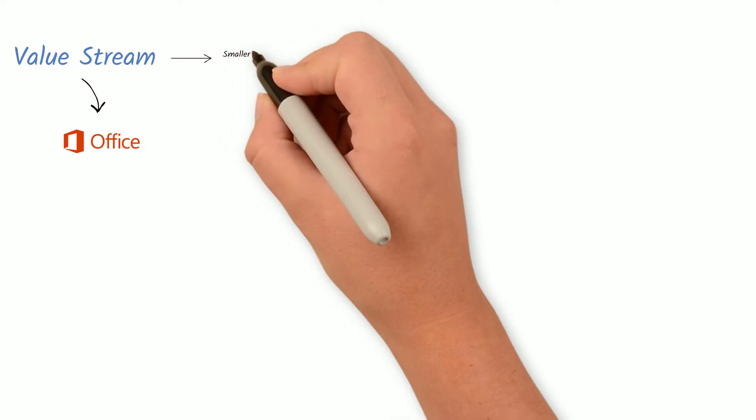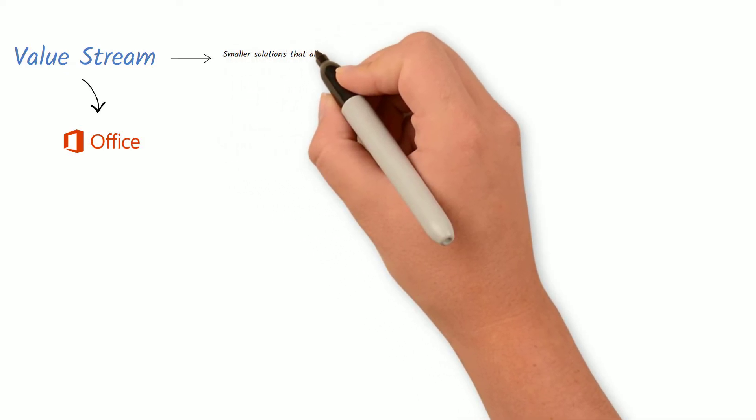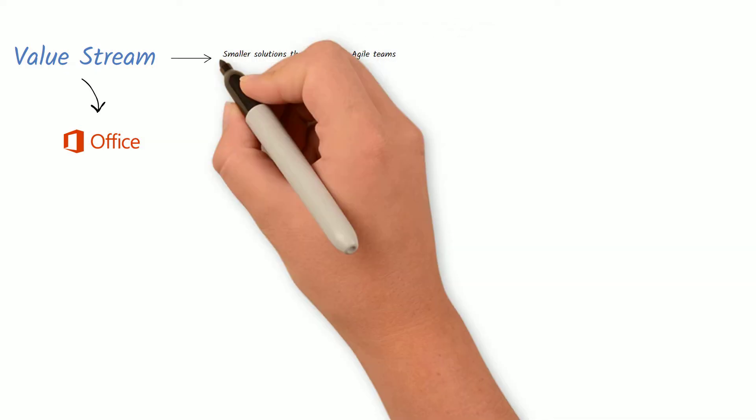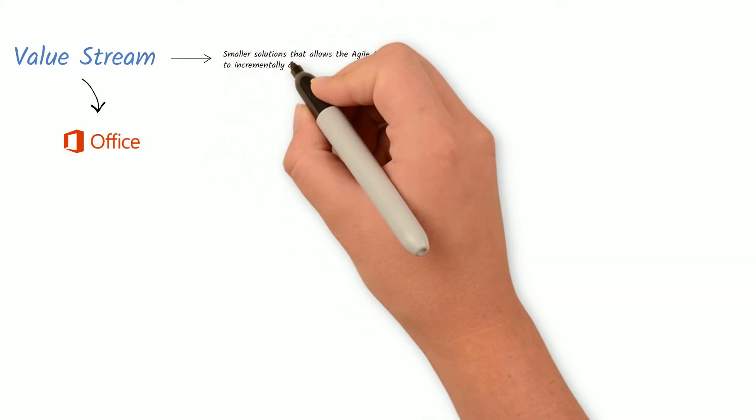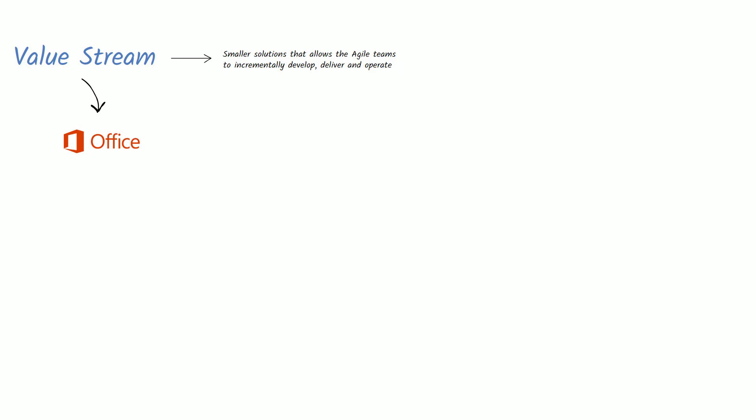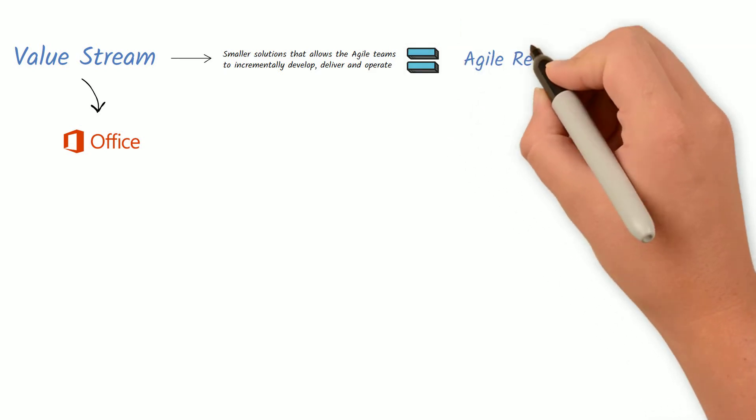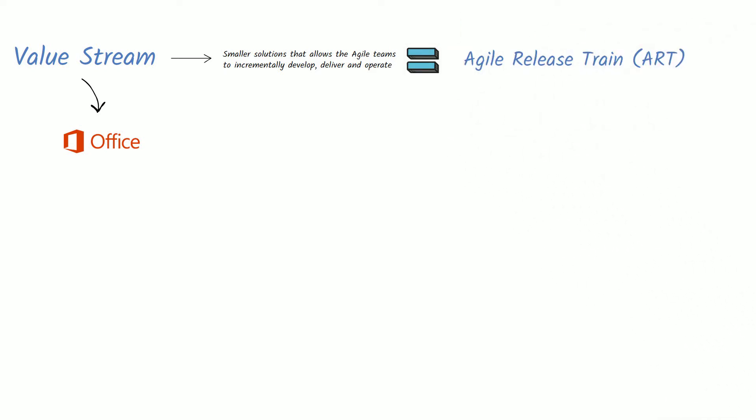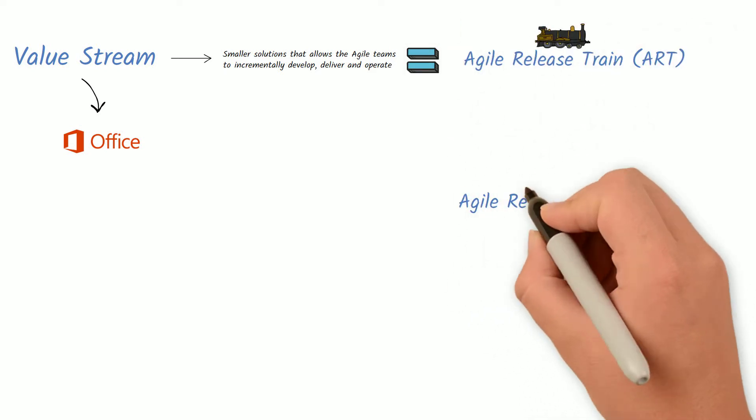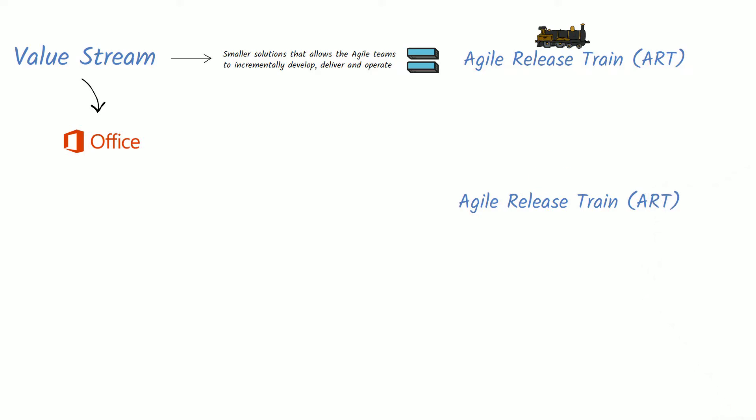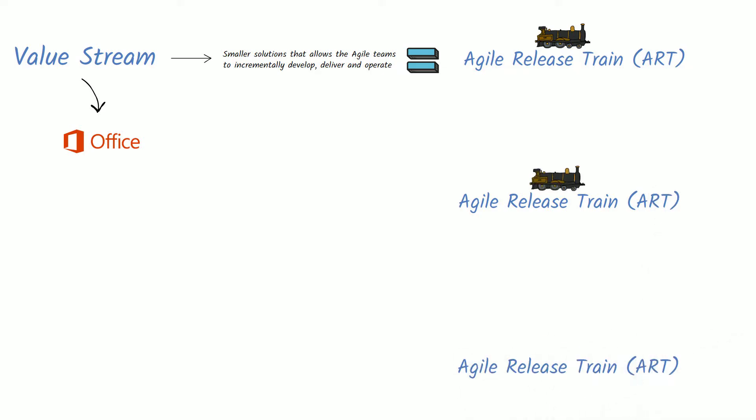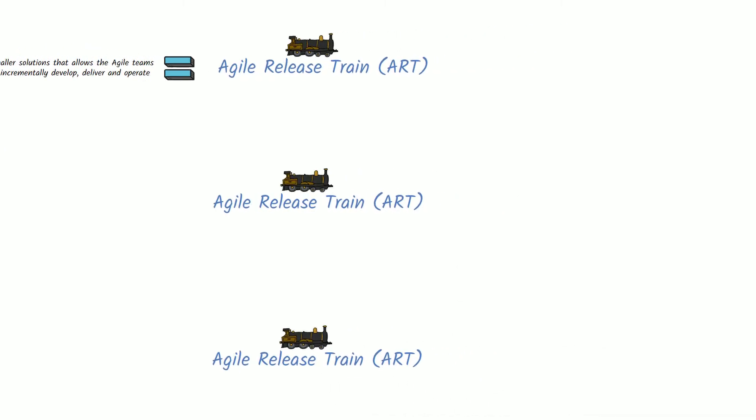Then they break down this large value stream in smaller solutions that allows the Agile teams to incrementally develop, deliver, and operate. This is called Agile Release Trains, also known as ARTs. A value stream can have one or more ARTs.